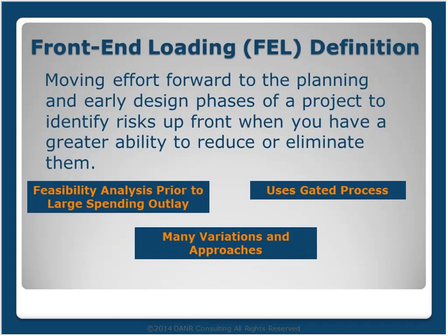So in simple terms, front-end loading studies, or FELs, can be defined as the exercise of moving effort forward to the planning and early design phases of a project to identify risk up front when you have a greater ability to reduce or eliminate them. This allows feasibility analysis to be done prior to large spending outlays.